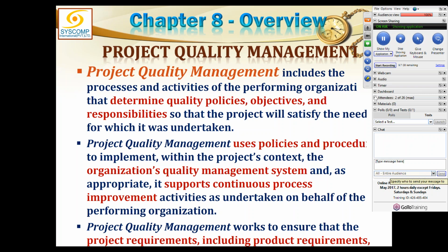It is done while the job is being done, during execution, and it has absolutely nothing to do with the end product or any output. It does not check the outputs. Quality assurance is not responsible for checking the outputs. Quality control exclusively looks at the outputs and inspects them and passes or fails them. If something passes, that is verified from quality control.